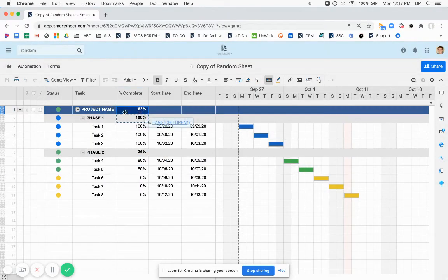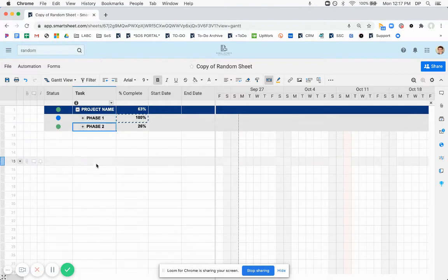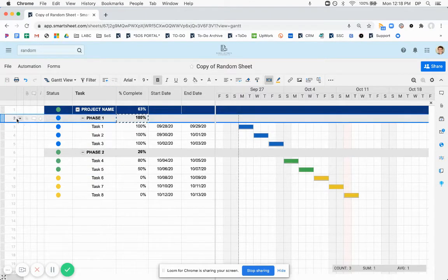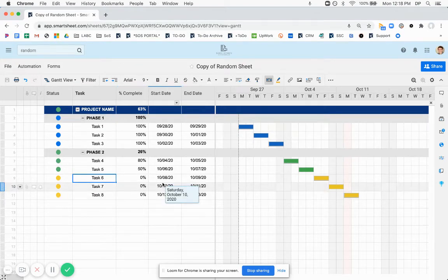Note that technically, that project level is going to be the average of the tasks, and that's kind of indirect because the literal children of this first row are these two here. So the average of 126 is 63. And then the literal children of this second level of hierarchy are these individual tasks. So it's computing based on its absolute children, but with every more layer of hierarchy, it gets kind of indirect. But the data flows regardless.